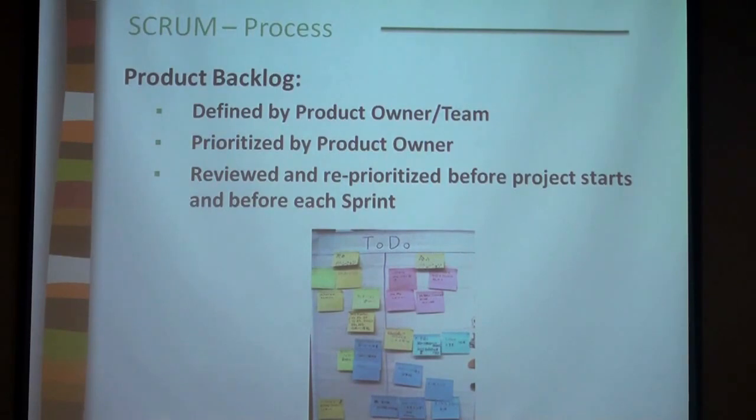In the sprint planning meetings, the product owner would go and say, you know what, I want these first five post-its to be implemented in the first iteration. And then development would come and say, no, you know what, we cannot do this unless we do this first, right? And then the product owner would look at this and say, yeah, but then we do not do this.